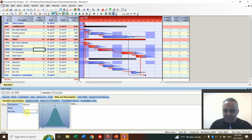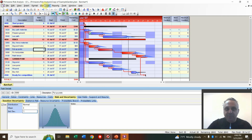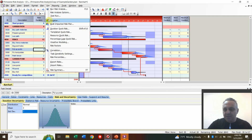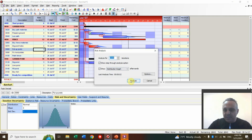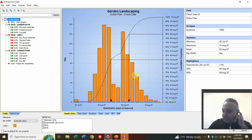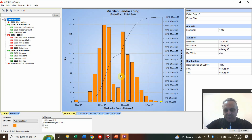By modeling all identified risks in activities one by one and gradually, you will have a risk-loaded schedule plan. This is the time to simulate and repeat the scenarios for one thousand iterations to get the results. You approach the Risk menu, select Run Risk Analysis, press Analyze, and complete the iteration. This is the first result we get from Primavera Risk Analysis. The results can reflect the project finish date, project resources, project costs, and so on. Let's understand this graph first.